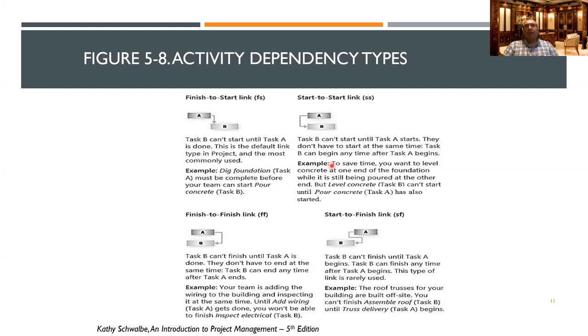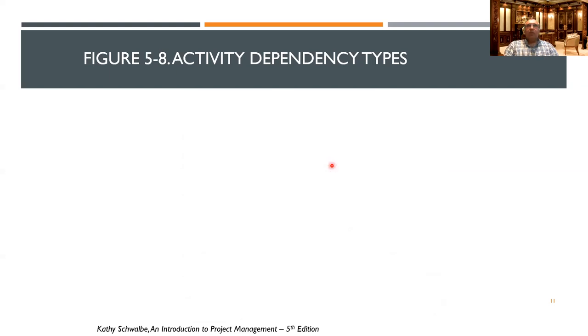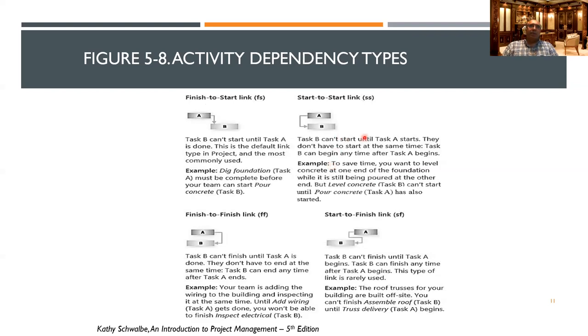Good, yes. And then the start to start link. So this one is the start to start link where task B can't start until task A starts. They don't have to start at the same time. Task B can start anytime after task A. So it means you start on A and then you can start on B. You cannot start on B until A has started. To save time, you want to level concrete at one end of the foundation while it is still being poured at the other end. So you're pouring the concrete. So you have a big room to fill with concrete on the floor.